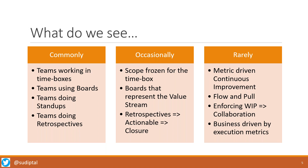Teams do retrospectives pretty regularly and I've seen a lot of momentum there. Occasionally, I've seen teams being able to keep scope frozen during the time box — I don't know how many of you are successful in doing that; I personally am a pretty miserable failure in being able to do that, but we try. Boards that represent the value stream — not just a task board of to-do, in-progress, done — are perhaps one of the most important success factors for continuous improvement. And occasionally, retrospectives actually get converted into actionables, and actionables get systematically and methodologically closed over a period of time.